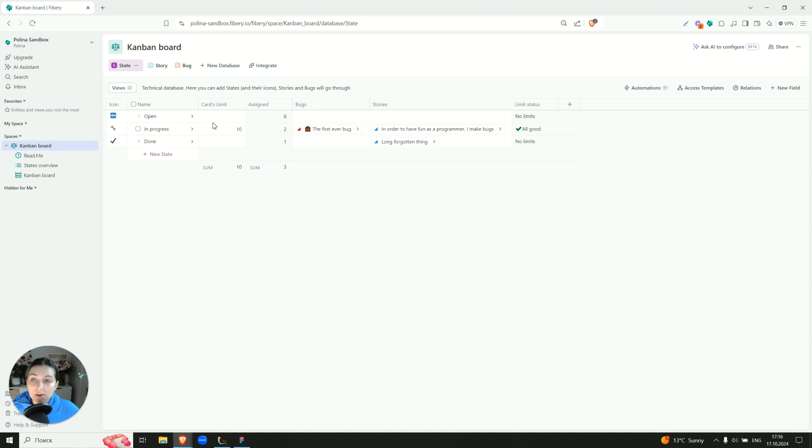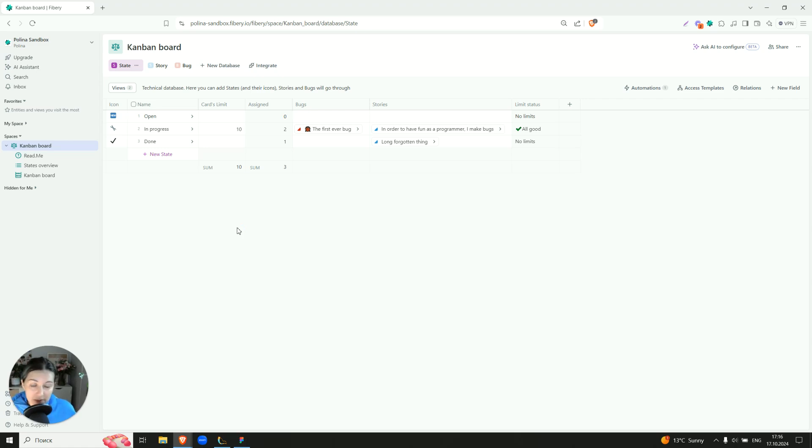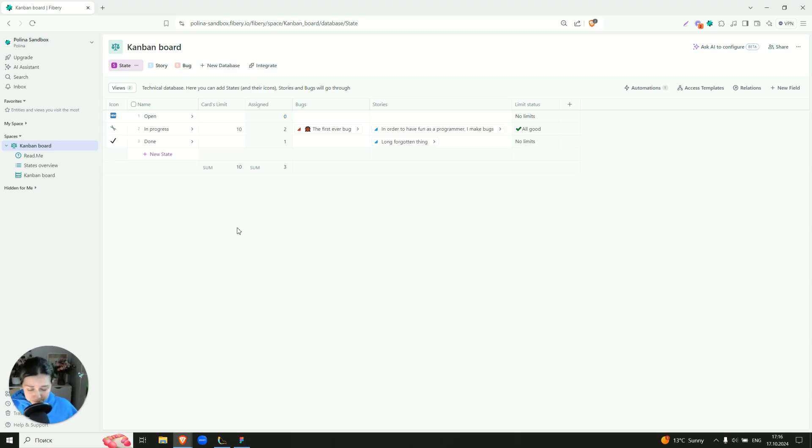Also, every state has its own cards limit. For now the limit exists for in progress only. For Done it probably indeed will be infinite, but maybe you want to set some for the open backlog as well. And the more states you have, the more likely it is that many of them will have cards limit.